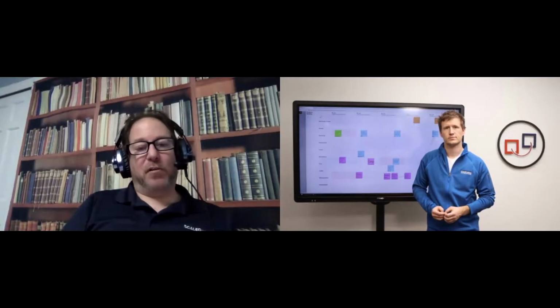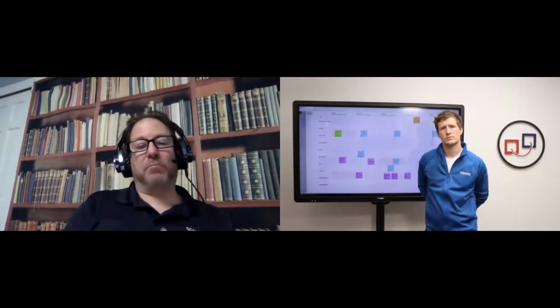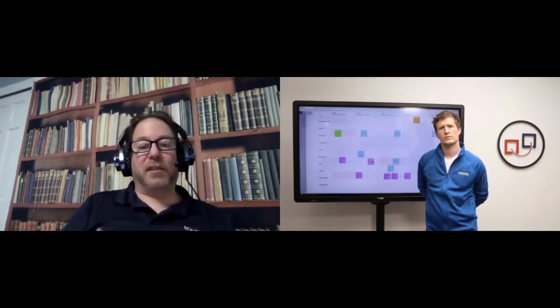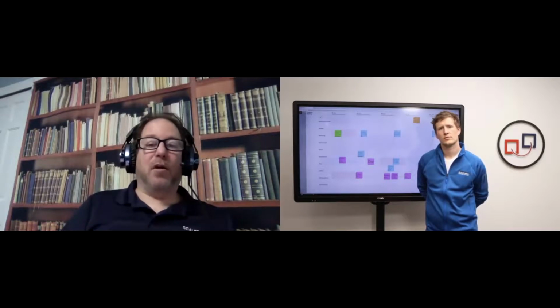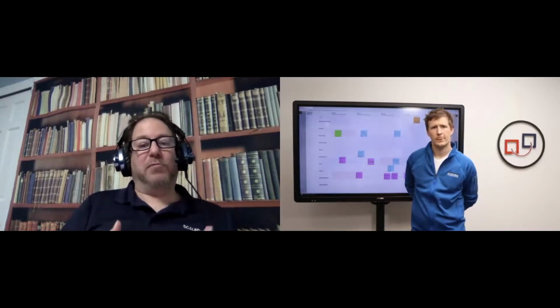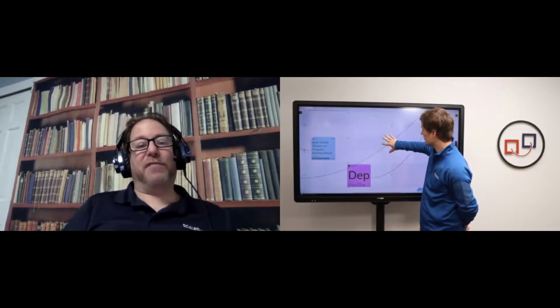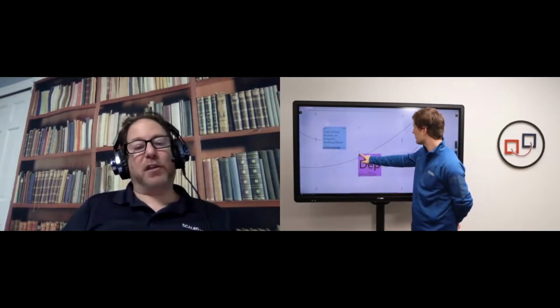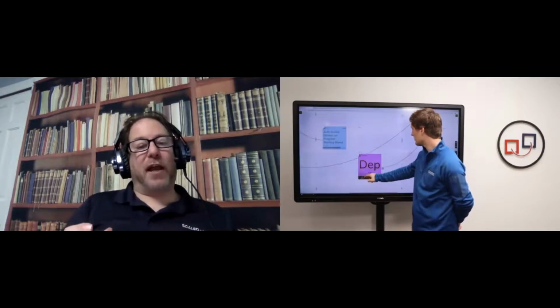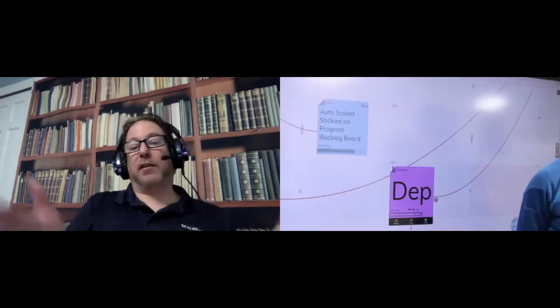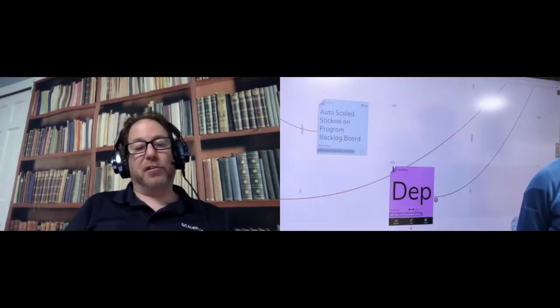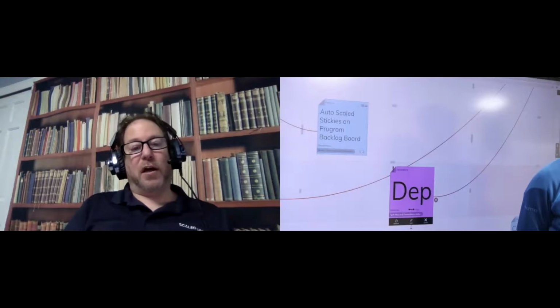So for example, if we were waiting on some connectivity through an API to get some data, well, in the meantime, if that's going to be delayed, we can create a mock, we can create a stub. So it's more about how are we going to respond to the change, and just seeing it visually and being able to quickly see what things are now impacted as a result of, say, that API being delayed, and maybe multiple features are dependent upon that feature.